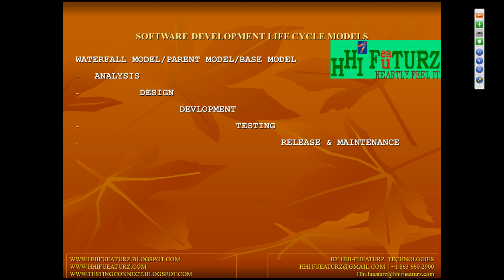Once this task finishes, only then do architects come into the picture, gather the requirements from the BRS, and come up with the high level design and low level design. Complete design of all those requirements, architects will come up with. Once design is completed, developers get involved and develop the entire application. Once the entire application implementation is done, they send it to testing.